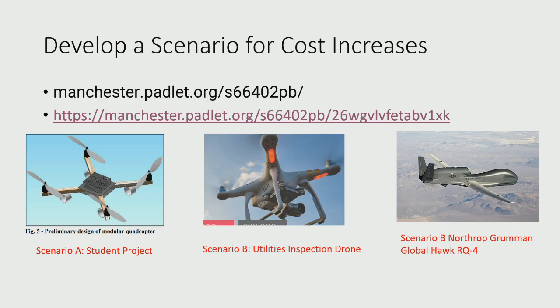Negotiate with suppliers in order to address the cost of products and money budget. So, the process of supplier negotiation. Sometimes you can be with a supplier and say, this is what we're going to charge. They say it's going to be £500,000. And you say, can you break that down into material, labour and overhead? And they might say, no, because we're the only supplier. We're monopolising you. It's going to be £500,000. So they put their profit in. That may be a very poor negotiation technique because they won't get the project next time. But they can do that sort of leverage. I've seen that with a component called a magnetron in the healthcare industry, which is part of a scanner. They had to pay the company anything they liked because they're the only ones who made it, and it was an old design which they hadn't changed.